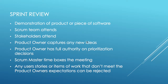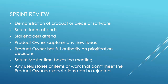It is only the product owner that can decide what the team can work on — and that is a key thing if you're going for certification. The Scrum Master is there watching the meeting. There might be one or two stakeholders that get a bit difficult to handle, and it might be the Scrum Master to say: any questions around business, direct them to the product owner; any questions around the process, redirect them to the Scrum Master; and any technical questions, to the development team. He'll coordinate the questioning and control the meeting so it's productive and not a blame game.